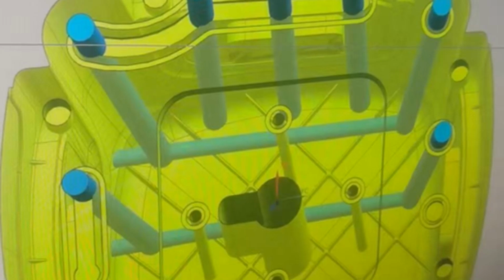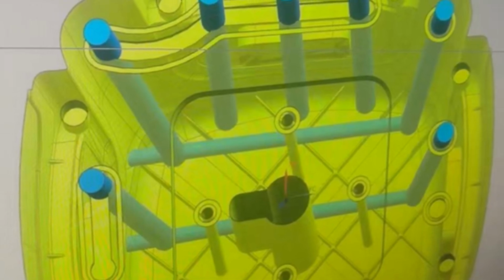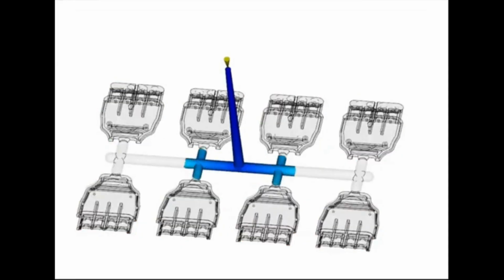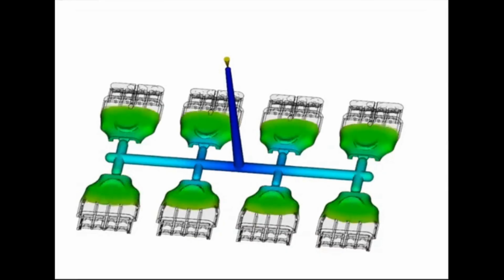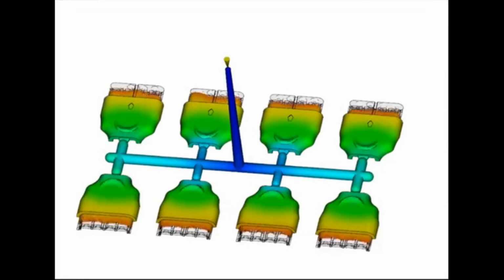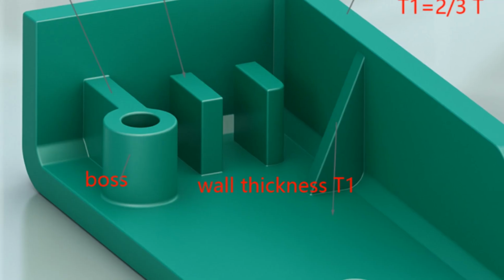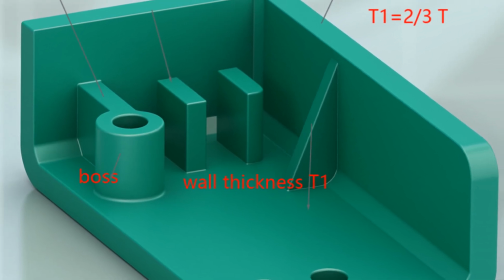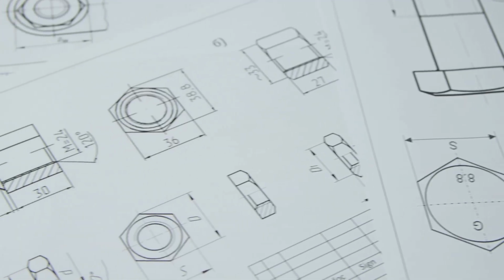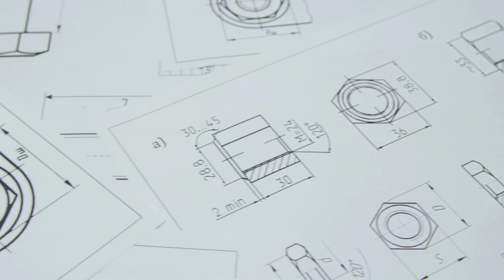Lock it down. Control the design and the deal. Before cutting steel, approve the final mold design: 2D, 3D, base, cavity, core, cooling, ejection, and gating. The DFM report is critical. It may change wall thickness, add draft, or move gates to prevent defects. Compare quotations beyond just the price.